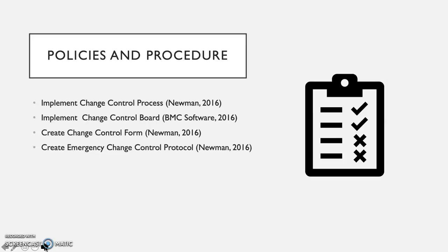There should also be a designated change control board that should be used to implement all of the policies and procedures mentioned within this presentation. The board could include a change initiator who is responsible for identifying the need for a change. The change coordinator will assess the need for change from the change initiator.